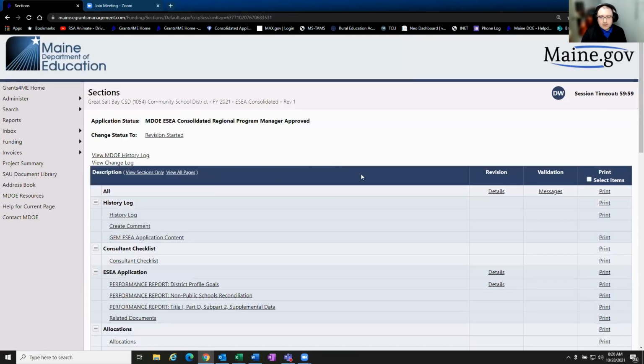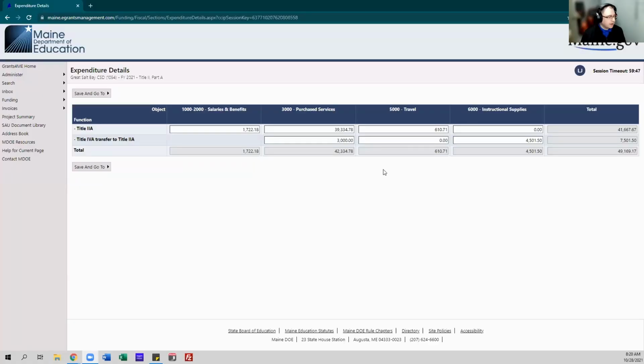And now I'm going to stop sharing and let Lindsay reshare. And then when she goes into her invoice, she should have the updated budget. Lindsay, you might have to refresh your page in order to see it. All right. So the fact that Lindsay is over by that $932 is okay, because she's not over by 10%, which would have been almost $4,000. So at this point, she should be okay to submit.